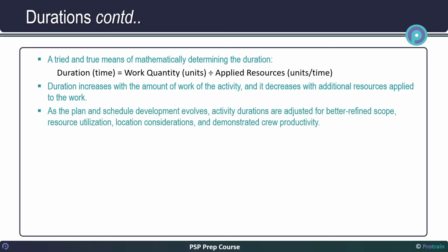As the plan and schedule development evolve, activity durations are adjusted for better refined scope, resource utilization, location considerations, and demonstrated crew productivity.